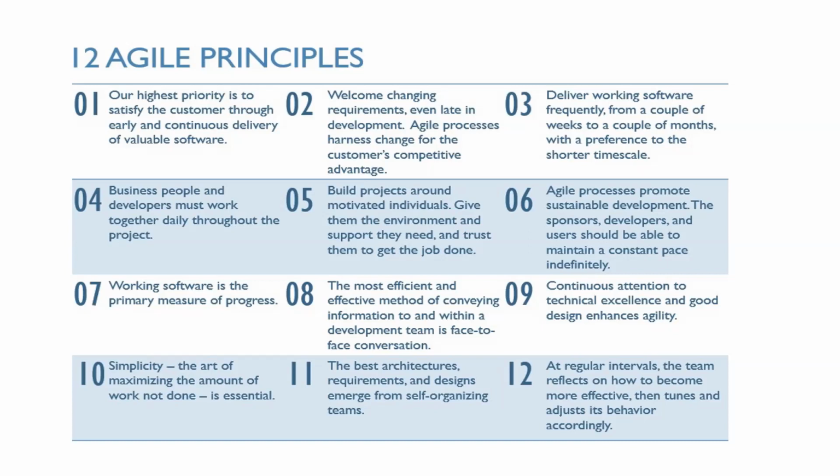So the BA in Waterfall is going to be writing high-level requirements, a big, high-volume BRD, business requirement document. But in Scrum, the BA might just be writing and elaborating on stories. Small tasks, elaborating, getting the wireframe and all those things on it. So you still do the same work, but maybe a bit differently.